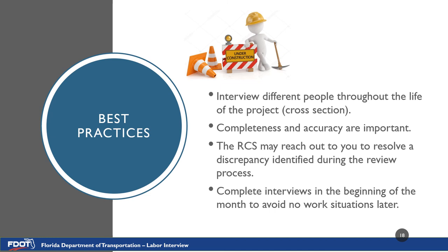Best practices: interview different people throughout the life of the project — do not interview employees from the same contractor throughout the whole project; it is imperative to receive a cross-section of interviews. Completeness and accuracy are important, as the RCS may reach out to you to resolve any discrepancies identified during the review process. Complete interviews in the beginning of the month to avoid no-work situations later. Remember, the required number of interviews is not a cumulative number — missed interviews one month are not to be made up the next month; it is a monthly requirement. Payrolls will substantiate if enough workers were on site to interview. If you choose to obtain more than the required amount, that is acceptable, but extra interviews do not roll over to the next month.